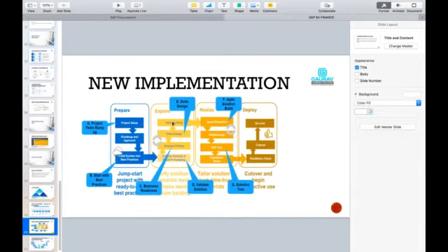That is nothing but a backlog. So in the explore phase, you have a complete fit document, you have a data design document, which is the functional specs, and you also have a checklist of the gap documents, so that you are on track of where exactly we are and how we can proceed towards the realization phase.